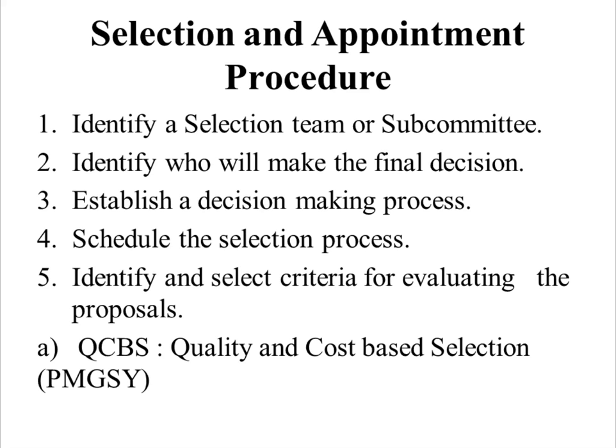The third procedure is to establish a decision making process. Then we need to schedule the selection process. The fifth point is to identify and select criteria for evaluating the proposals. So these are the various criteria for evaluating the proposals.